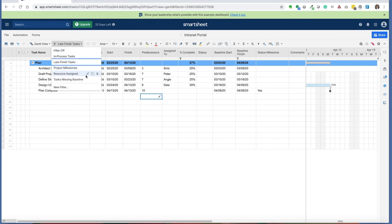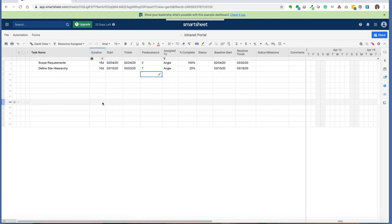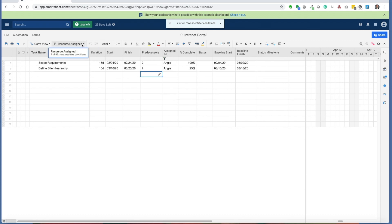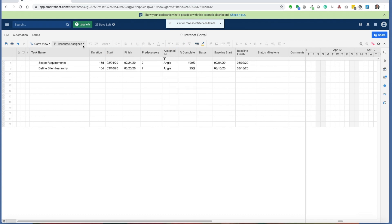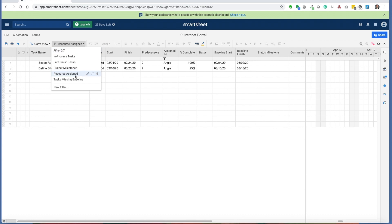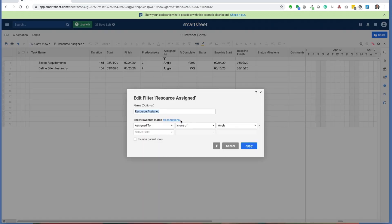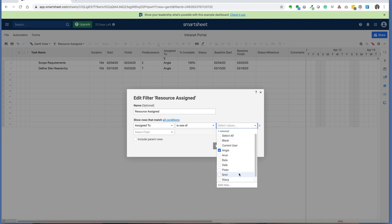The next one to look at is resource assigned. The resource assigned task is useful in leveling your project, as well as identifying all the different tasks that are assigned to a given resource. Here, I open this filter up, and you'll see that it is assigned to one of, and you can select from any of the users within your project schedule.